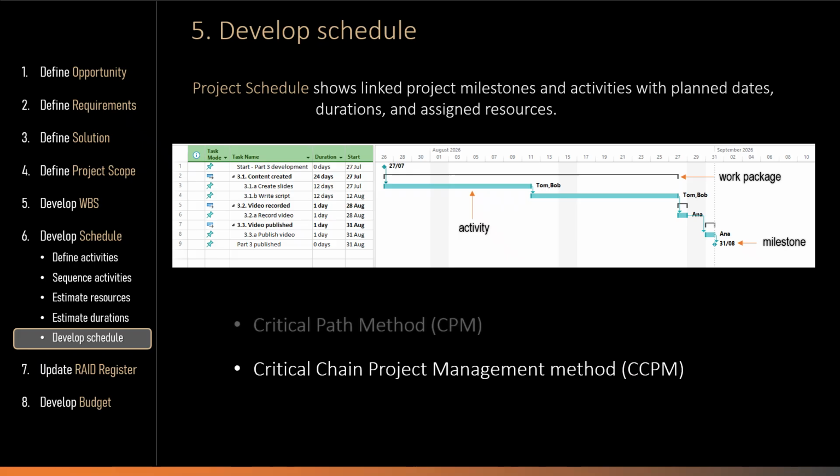Critical chain project management is a contemporary scheduling and control method based on theory of constraints. The key idea is that instead of trying to control every single task deadline in isolation, critical chain project management protects waste-free execution of activities which belong to the critical chain of the project and helps management attention to be focused on resource constraints, estimation uncertainty, and human behavior.